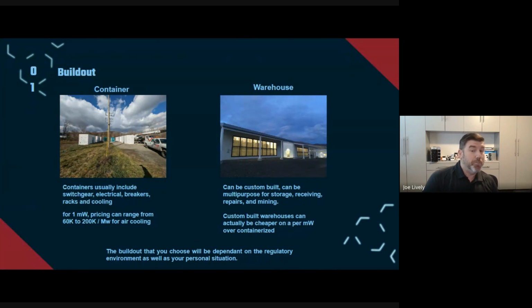In fact, you could do a poll of the people who know in this room. It's damn near impossible to get a primary metering cabinet today in under 6 months. And so these are things that we'll talk a little bit about. On top of cost is the lead time that goes into some of these things.